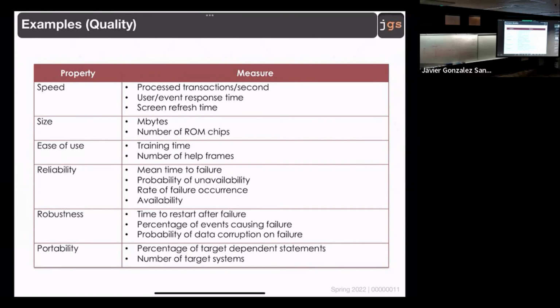Having 100% reliability, it is not considered possible, and as a result, would not be. Okay, very good point. We're talking about reliability, right? So 100% not being possible is something that you need to explain to your customer. Now, what is possible? Because your work is to tell me, okay, I cannot do that, but in the best case scenario, what I can do is guarantee that I am going to create a system and the number of failures that you are going to have is 1 failure per month, 1 failure per year, something like that.